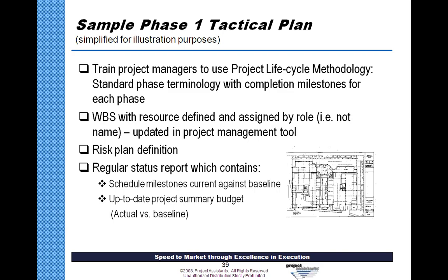We talked about the adoption process, and when we talk about a tactical plan, in this case it's just a simple phase 1 tactical plan. Train project managers to use project lifecycle methodology, standard phase terminology with completion milestones for each phase. What do we mean by that? We're starting to talk about creating a language. Some organizations refer to this as stage gate terminology.